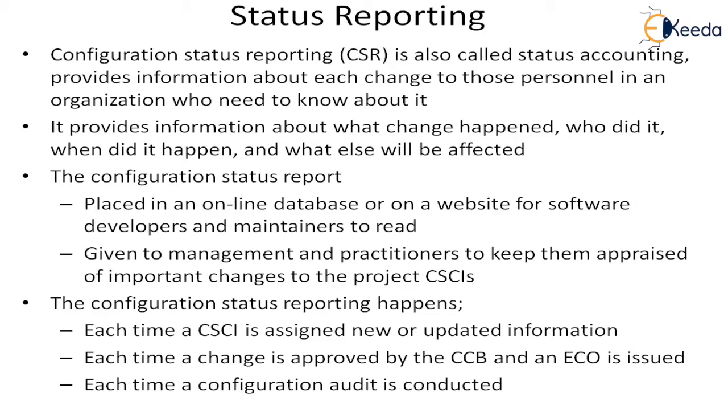It provides information about what change happened, who did it, when it happened, and what else was affected by it. So this kind of information it will give. The configuration status report is placed in an online database or on a website for software developers and maintainers to read, and given to the management and practitioners to keep them apprised of important changes to the configurable items of the project. So there are two ways it is distributed. One is a common area where everybody can read it, and another is by giving it to the specific practitioners and the management.